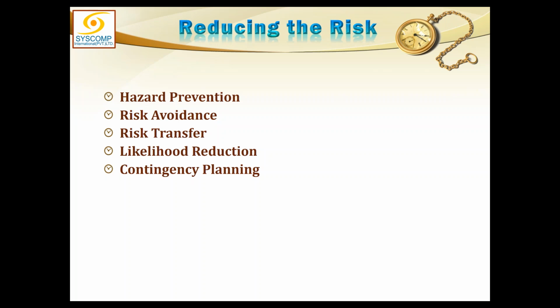So 1,000. How much? So 1% of 1 lakh is 1,000. And what was the impact when you had not taken this action? The whole, that was 1 lakh. 10% multiplied by 10 lakh, and that was 1 lakh. So you see, by taking these two measures, I have reduced the figure of 1 lakh to just 1,000.